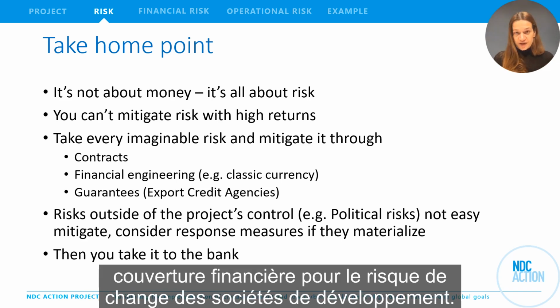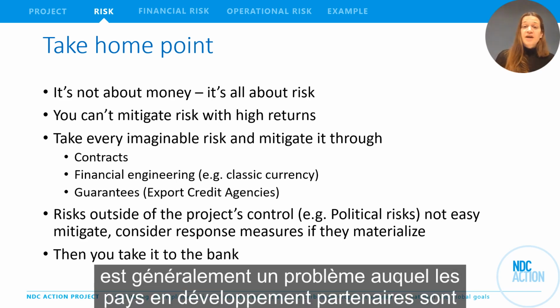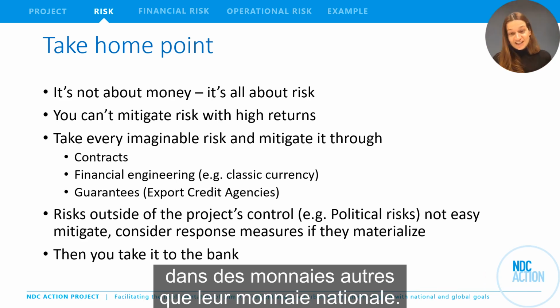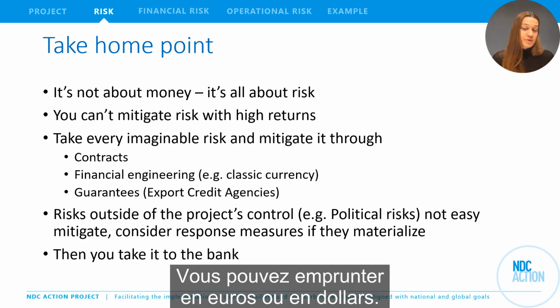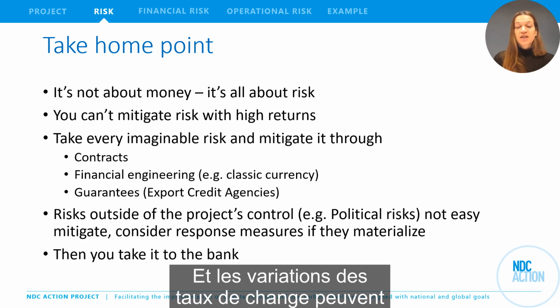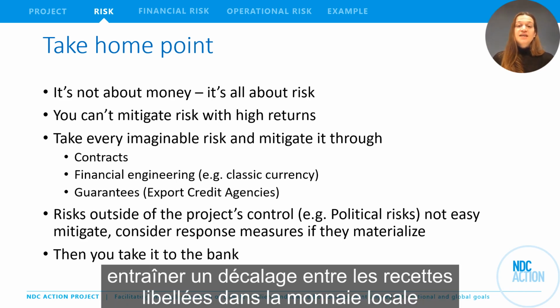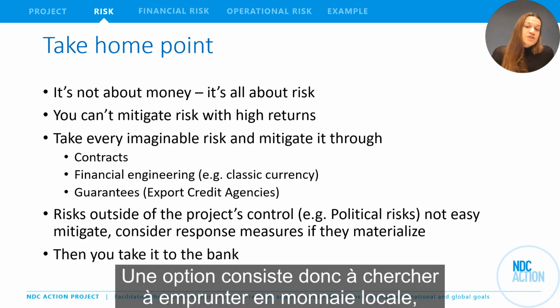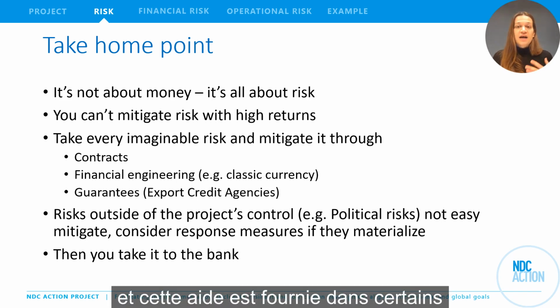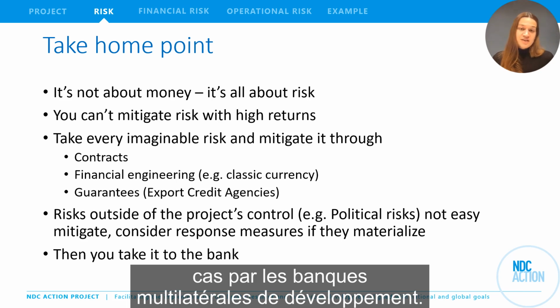Another option is to seek financial cover. In development cooperation, currency risk is typically something that developing country partners face when borrowing in currencies other than their home currencies. So you borrow in a currency other than what your revenue might be in. Maybe you borrow in euros, maybe you borrow in dollars. And changes in foreign exchange rates can result in a mismatch between revenues denominated in the local currency and interest and principal expenses denominated in another currency.